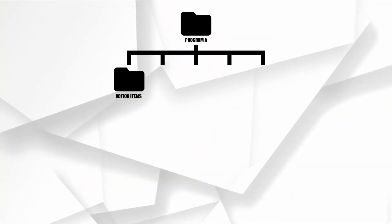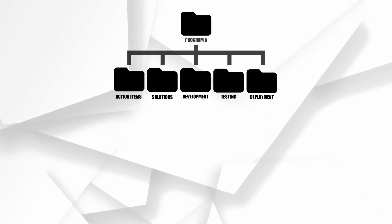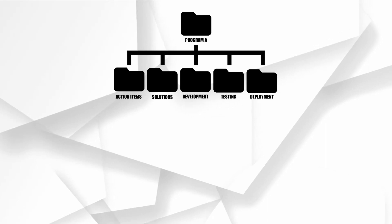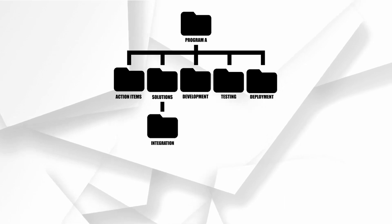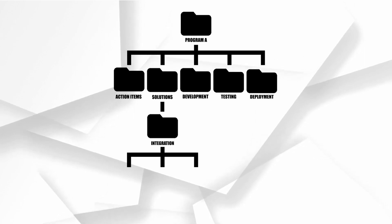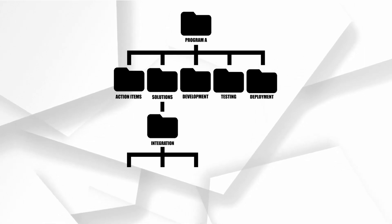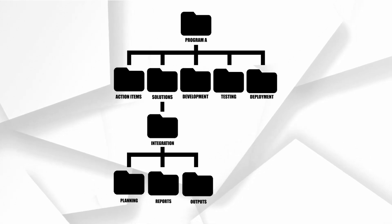Someone from your PMO team will create a major program folder with several subfolders: one for Action Items, one for Solution, one for Development, one for Testing, and one for Deployment. If you are working on the project in an integration role, you'll place your structure into the Solution folder. Inside there, place your integration folder, and inside that folder, organize it your way — but not in a messy way. Create folders for your planning, your reports, and your information exchange with peers.